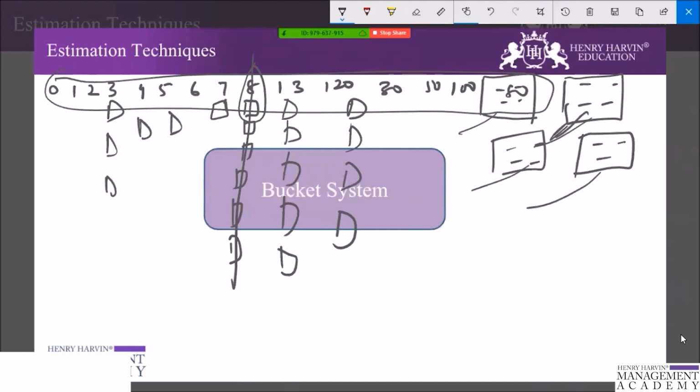So there are two ways we can do it. One is that if there are multiple items, say 400 items that need to be estimated, we can have 10 people. We can give 100 items per person, or maybe 50 items per person, and this person can arrange them in the form of buckets. Then we can ask another person to go through the bucket list and see if they want to move any item from one bucket to another bucket.